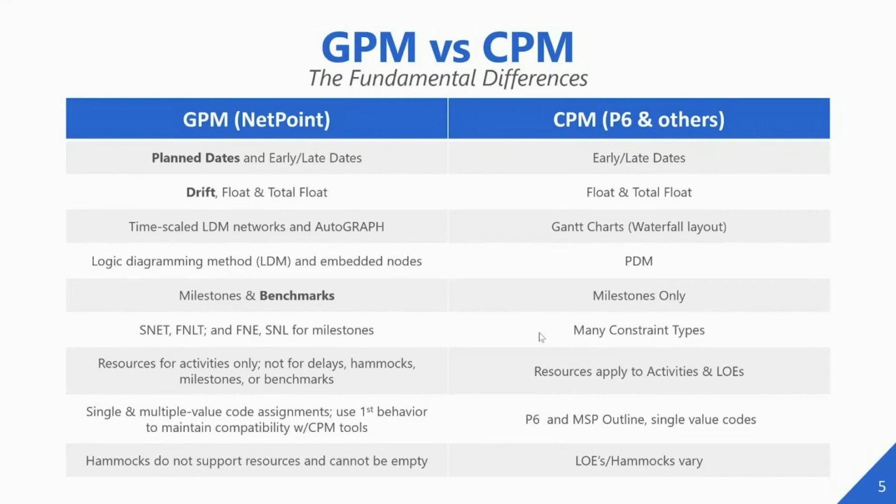Other things that are ignored on the import into NetPoint from P6 are resources that might have been applied to LOEs or WBS summaries, and any resource calendars. Basically, WBS summary objects by themselves aren't supported in NetPoint.